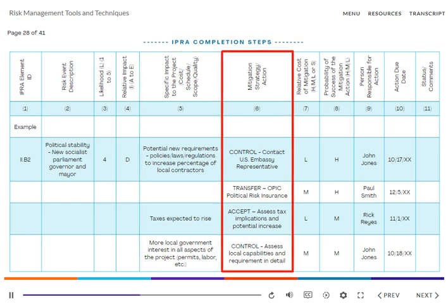Once the event or issue is identified as critical due to the likelihood of occurrence and/or the relative potential impact to the project, the team should identify and follow up on a mitigation strategy and/or action specified in column 6 to mitigate it. Several actions or strategies may be identified, studied, and documented for each of the items entered in columns 2 and/or 5. Additional analyses using probabilistic methods may be warranted as well.